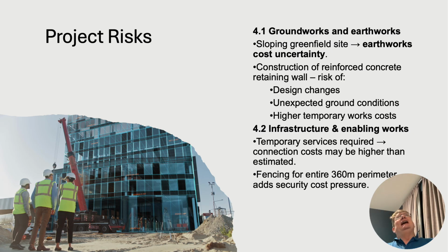I remember under the old ICE contracts, the contractor and the subcontractor were liable if they found something underground that they might not be able to see, because obviously it wasn't foreseen. These days under the NEC, because the NEC took over from the ICE forms of contract, it's less adversarial with regards to that.